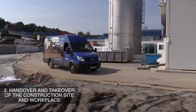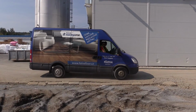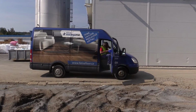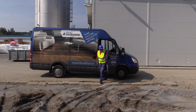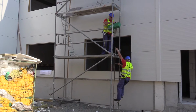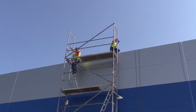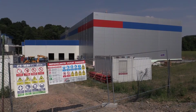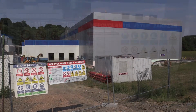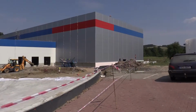In addition to requirements related to work safety, it is necessary to take into account that the construction site and worksite area is defined before the initiation of the project. Examine the construction site for full protection system, job site access, possibilities to handle and store material, connection to energy supplies with consumption measuring, eventual operation restrictions with respect to fire protection and preservation of the environment.